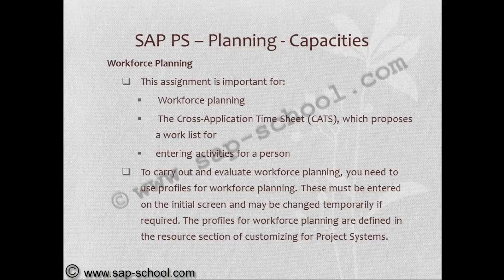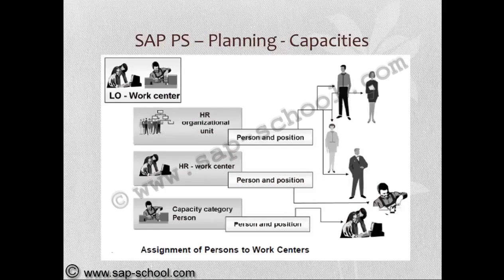To carry out and evaluate workforce planning, we need to use profiles for workforce planning. These must be entered on the initial screen and may be changed temporarily if required. The profiles for workforce planning are defined in the resource section of customizing for project systems. So this is the assignment of persons to work centers. We are assigning the persons from the HR organizational unit person-wise or position-wise, or from the HR work center or capacity category also. Capacity category by individual capacities.